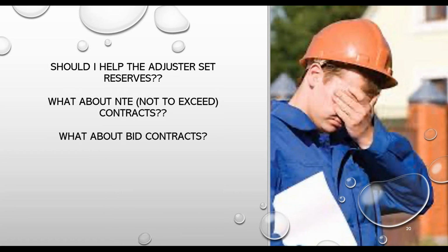And then you should also have an estimate on how long you think the mitigation portion of the job will last. So let's say your burn rate's 10,000 a day and you think you're going to be there 10 days, then it might not be too bad to say, we're going to be somewhere in the ballpark of 100,000. Now, if you're going to step out on that plank and do that, I recommend ranges. In that scenario, I may say, I think we're going to be between 80,000 and 120,000, somewhere in that ballpark. A ballpark range gives yourself a little out.